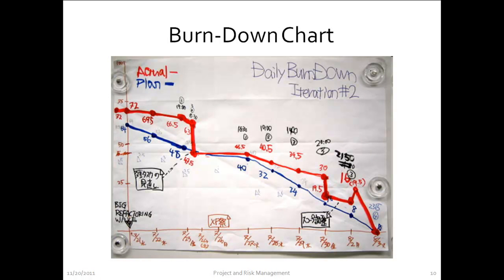This chart is a typical chart used by an Agile team to track progress — it's called a burndown chart. The x-axis shows dates and the y-axis shows story points remaining. The blue line shows how many story points are left at the end of each time period. So you started off with 64 story points; at the end of the first iteration you had 56, then 48, then 40, and so on — that's how you planned for your story points to be implemented.